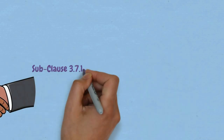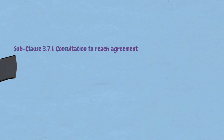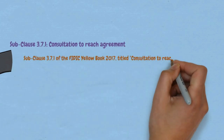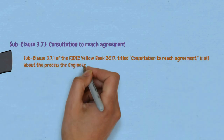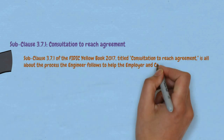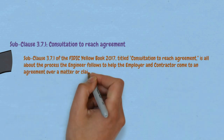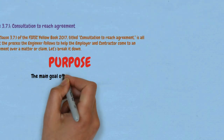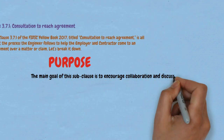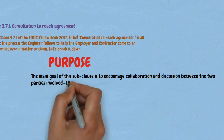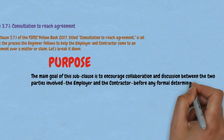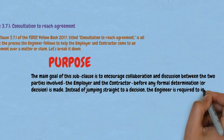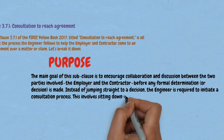Sub-clause 3.7.1, Consultation to Reach Agreement. Sub-clause 3.7.1 of the FIDIC Yellow Book 2017 is all about the process the engineer follows to help the employer and contractor come to an agreement over a matter or claim. The main goal of this sub-clause is to encourage collaboration and discussion between the two parties before any formal determination or decision is made. Instead of jumping straight to a decision, the engineer is required to initiate a consultation process.